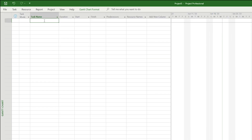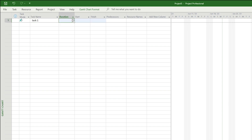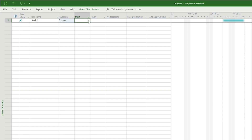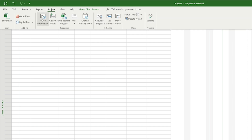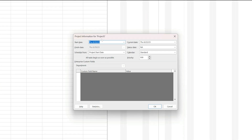The first thing we have to do is create some tasks. Click in the task name field to enter the name of your task. Give your task a duration and set the start date. The finish date is automatically created for you and you can see the taskbar appear on the Gantt chart. By default, project will update the project start date to the start date of the first task you create. If you want to change the start date, click on the project button in the ribbon and select project information.